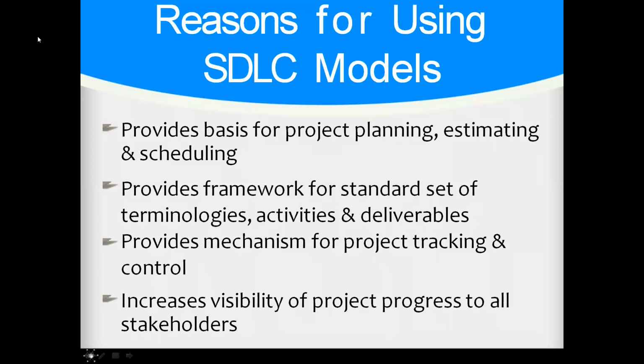How do I cope? If I buy 9.5, I have to do upgrades, so you are taking about 50%. If you want a licensed copy, fine, this is how much. But if you have already set it in your project planning that use of free resources is at XYZ cost, use of licensed resources is at XY cost, use of licensed and online backup or cloud backup is at so costing, he knows what he's going for.